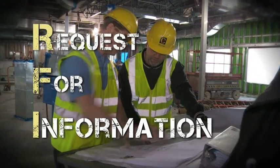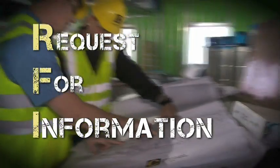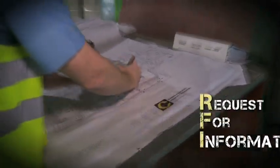The thing when you're using a Revit process or a BIM process is you create generally more RFIs, but the RFIs get shifted to the front end of the project. Where we see a discrepancy between an architectural plan and an electrical plan, we'll create an RFI and send it off to the general contractor and through the channels to get the answer. We've seen a shift in when that happens. Before, it happened on the job site, and the RFI at the job site creates delays. We have to stop, pull back, wait for an answer, then go back into that space. It costs everybody money at that point. If we can create an RFI before we get on site, we get the answer back and can continue with our schedule unabated. So it speeds up the whole process.